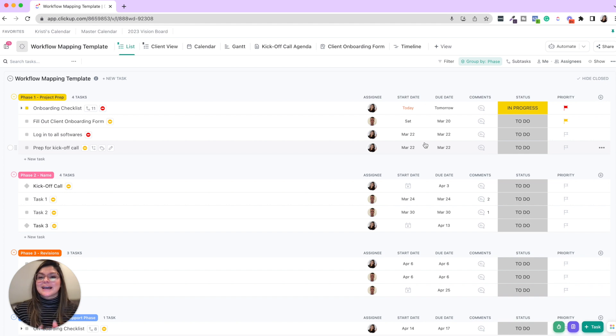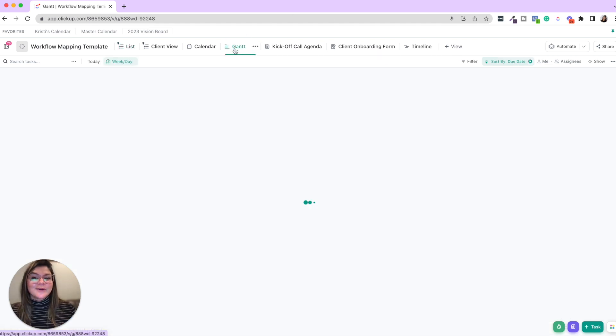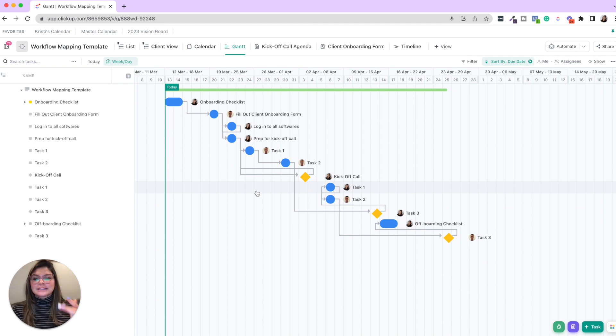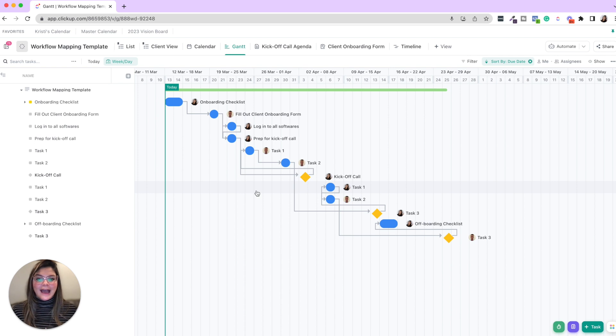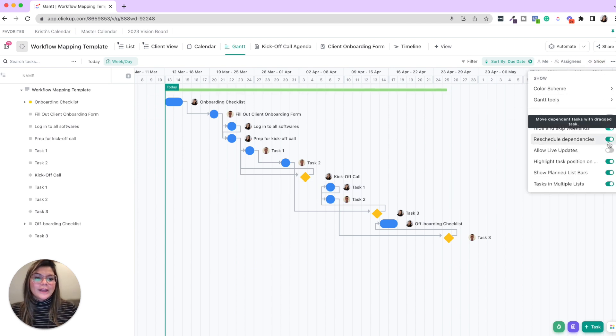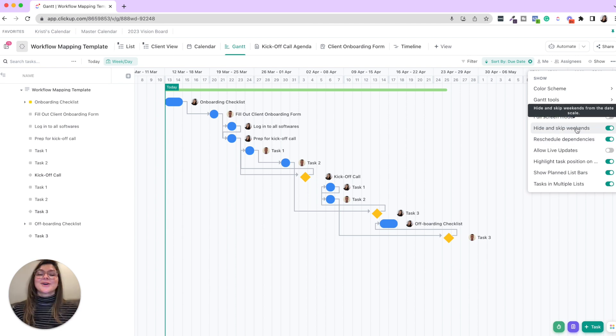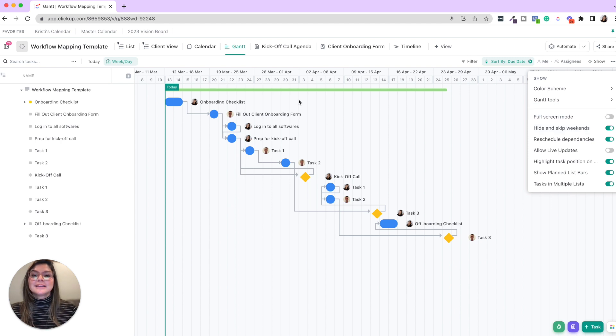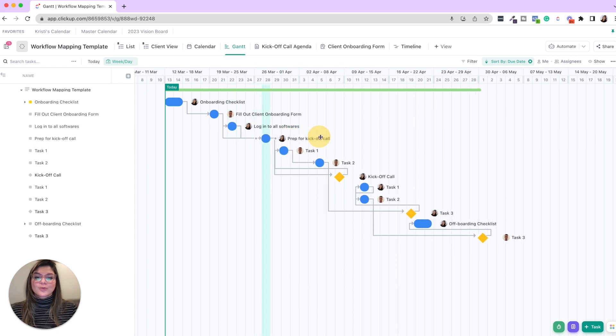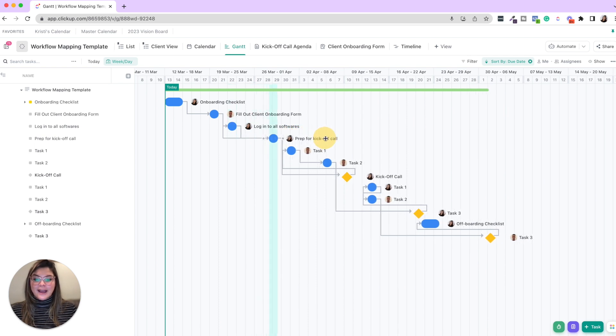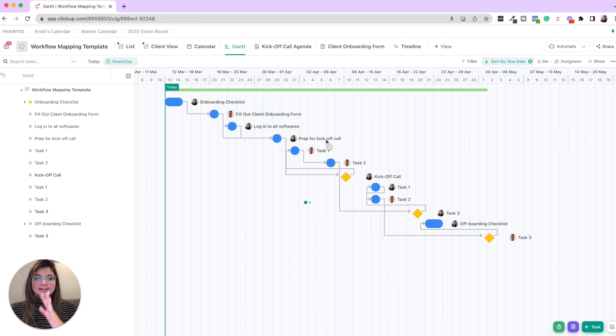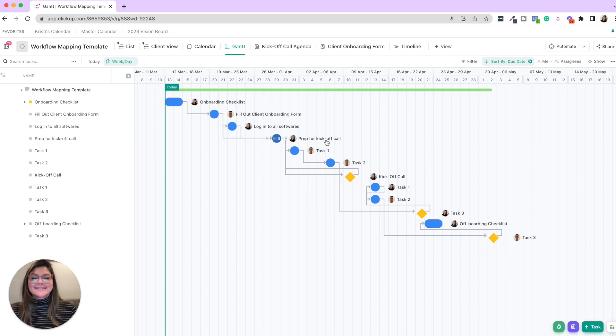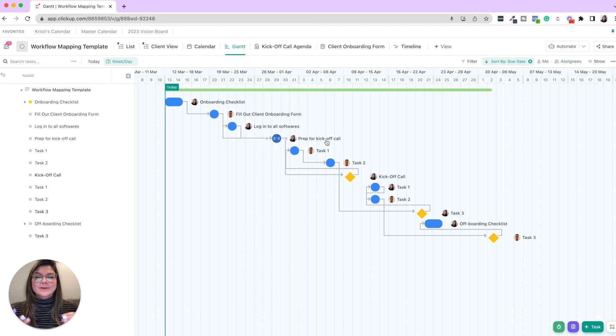Now, a really awesome thing about this as well is I love viewing dependencies in Gantt view. Here you can kind of see this water flow of tasks that are waiting on or blocking other tasks. So if you have show and reschedule dependencies on, pro tip, you can also hide and skip weekends. Then if anything is lagging at any point, you're going to see the rest of the entire project is going to be pushed forward.